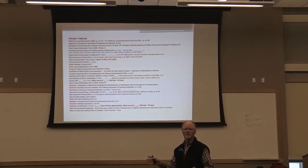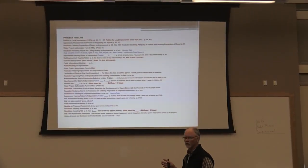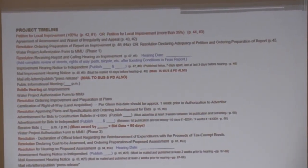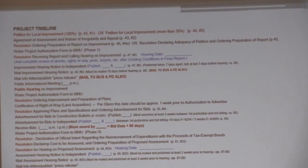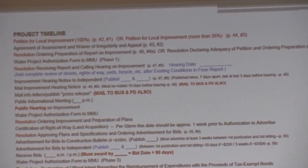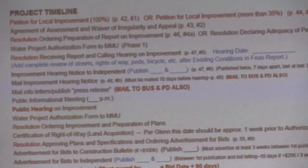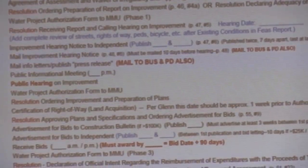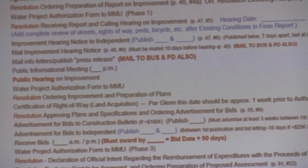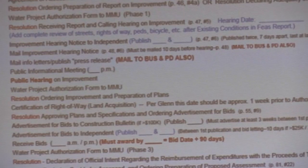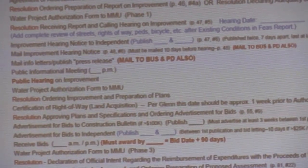This list shows project timelines — all of these things we do before a project even begins. It starts with either a petition or a request for a project, then an agreement of assessment and waiver, then a resolution ordering preparation of the report by the City Council. We then take that project to Marshall Municipal Utilities, and if it's a joint construction project where MMU has financial interest, they do an authorization for us to proceed.